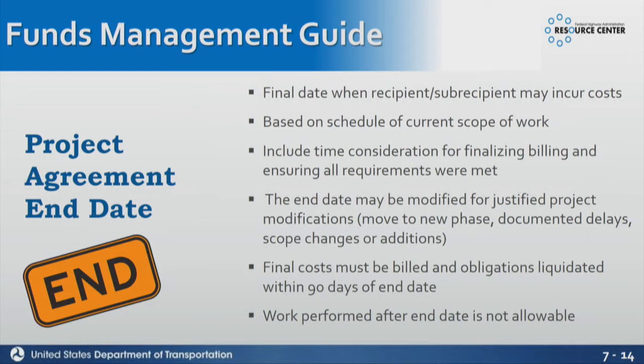So that's why it's really important to monitor that end date. We do have some provisions out there that allow costs that were incurred prior to authorization to actually be billed, but we've actually asked the lawyers, got a legal determination, and let's say your end date's September 30th, you forgot to ask for an extension, your contractor's doing work October 1st through October 15th, and then you're like, oh, we need to extend our end date.